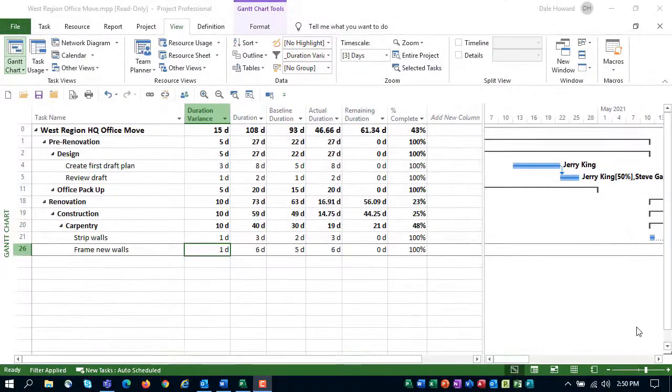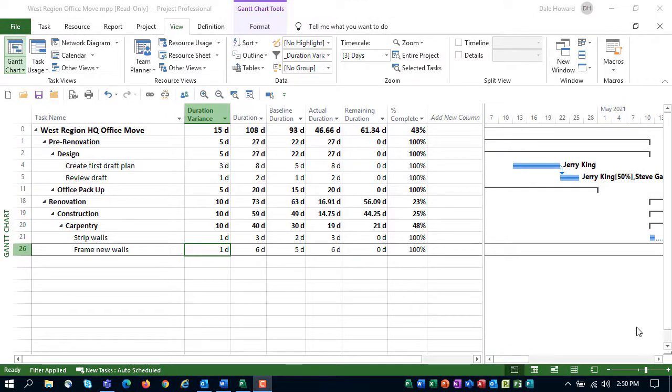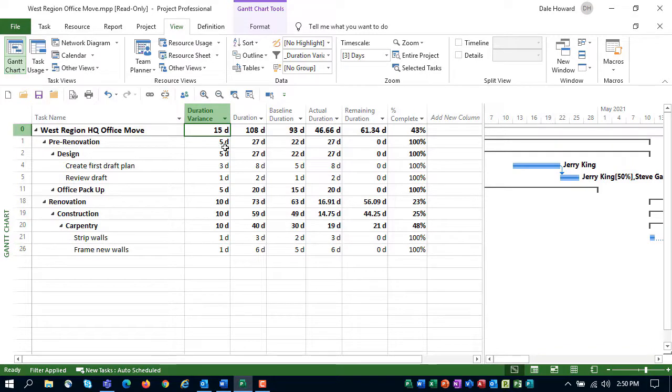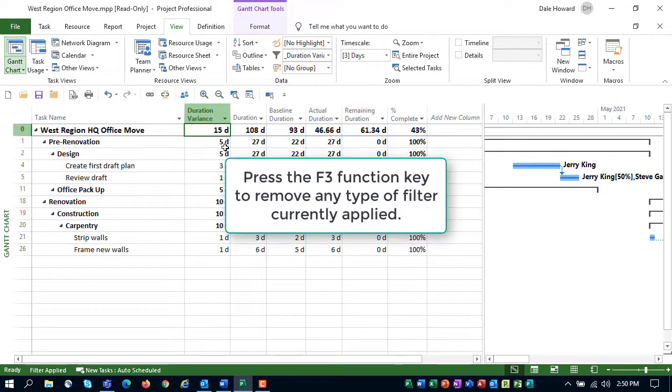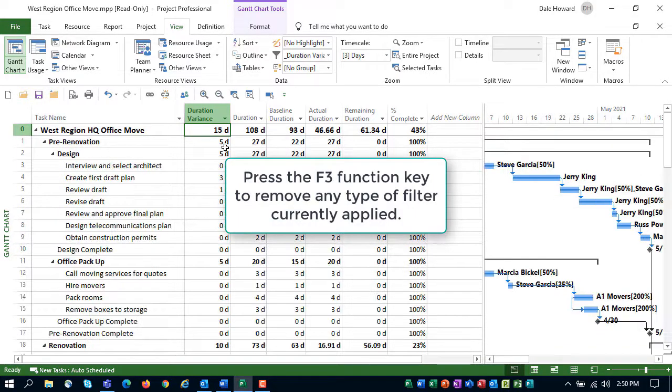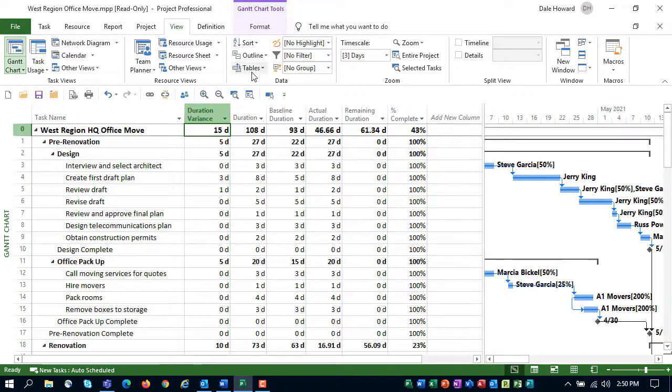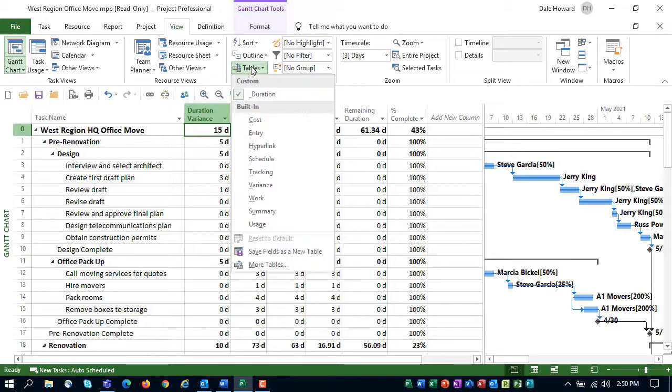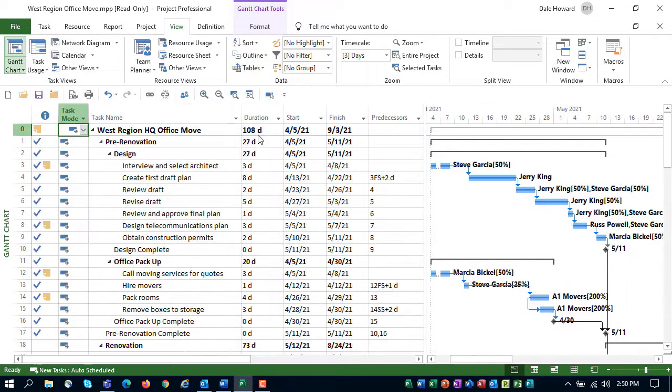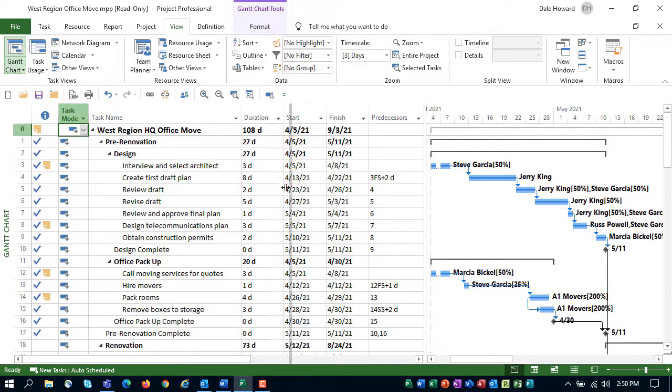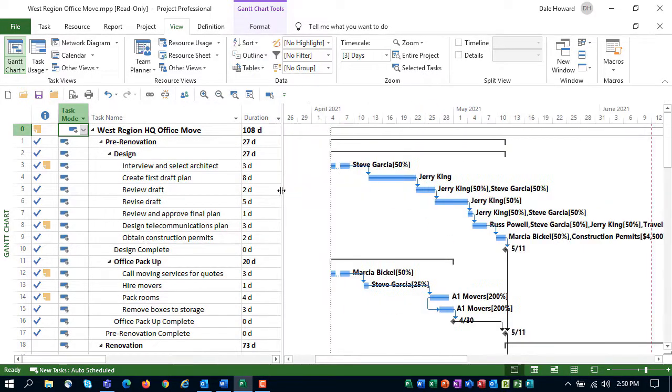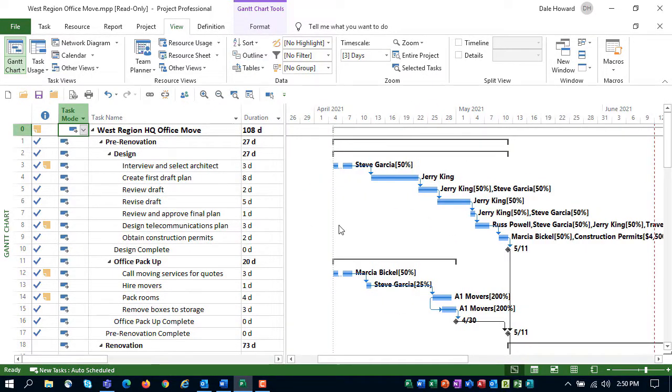After creating and testing both the new custom table and filter, I recommend that you reset the Gantt chart view to its default settings. To do this, press the F3 function key to remove the filter. Then click the table's Pick List and select the Entry table. Finally, drag the Split bar back to the right edge of the Duration column.